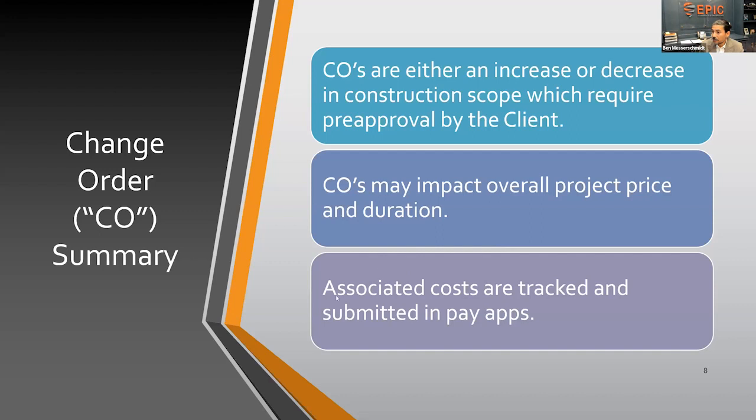Now, ultimately, these change orders will be reflected in the payment applications, or the pay apps as they're commonly referred to. So you'll know where your base contract started, let's say arbitrarily $100,000, and during the course of it you went through about 5 different change orders, which each amounted to about $10,000. And so your new contract value is going to be $150,000. We'll go through an example a little bit later during this course, so you can see more.